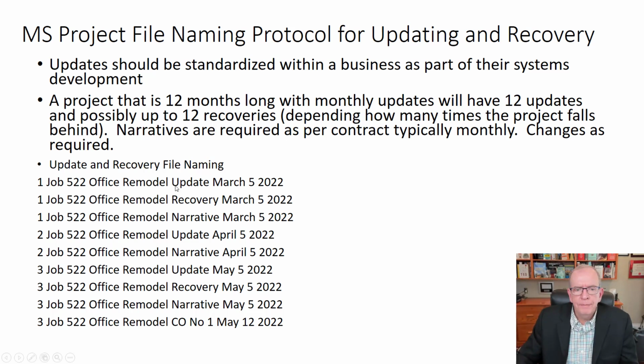So if we do an update, say we do an update once a month, right? A formal update. Very often if you have stakeholders, clients, you have to provide a formal report to them once a month on how you're doing. Internally, you may be doing weekly updates, you may be doing short-term planning schedules that feed into the master project schedule, which again, there's all kinds of different technologies being used with that in IT and construction.